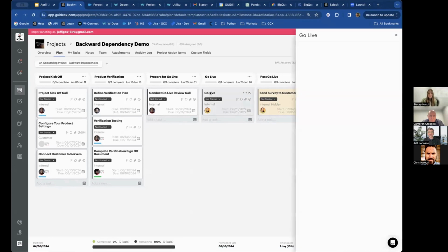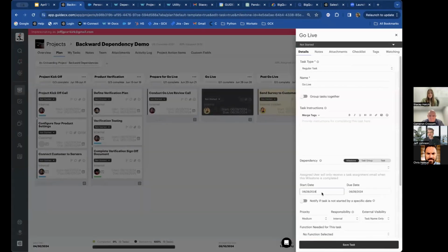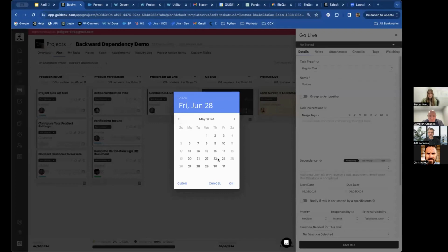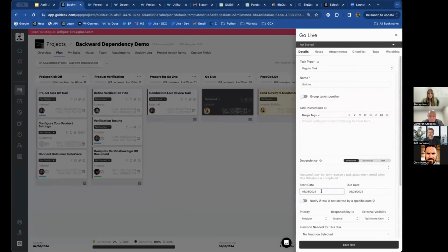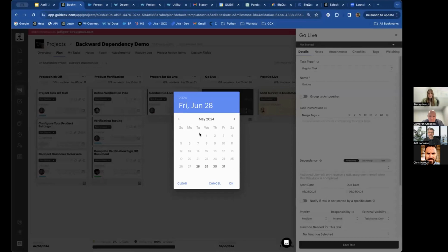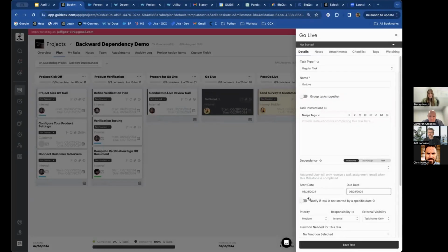Okay, so let's say though that I get really aggressive and I say, all right, I want to pull this entire schedule into May. So I'm going to pull it in a whole month to make go live May 28. And notice what's going to happen when I save it here. But first, I want to point out one thing. I'm setting the dependencies such that when I change go live myself, the recipe is going to change, say, project kickoff. But then notice the two tasks below it. They're just using the standard dependencies that you're familiar with in GUIDEcx already.